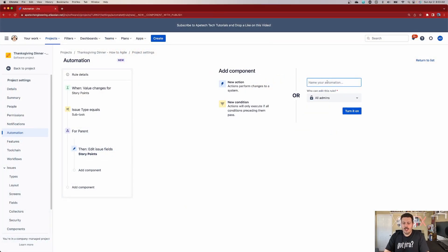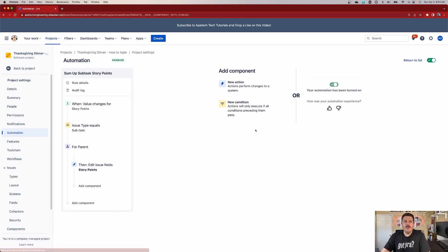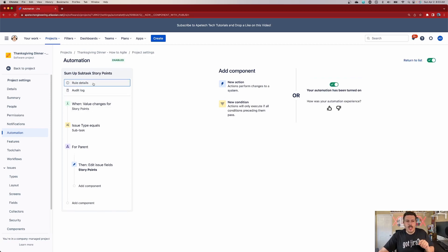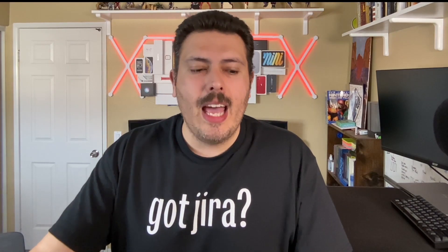Once you do that, hit save, call the rule 'Sum up subtask story points,' and then turn it on. If you've watched my other videos, double-check the rule details and make sure this is only working in one project. Atlassian is clever — only on enterprise plans do you get unlimited automation executions, so if you run this globally you will hit limits. Make sure the scope is defined to just that one project.